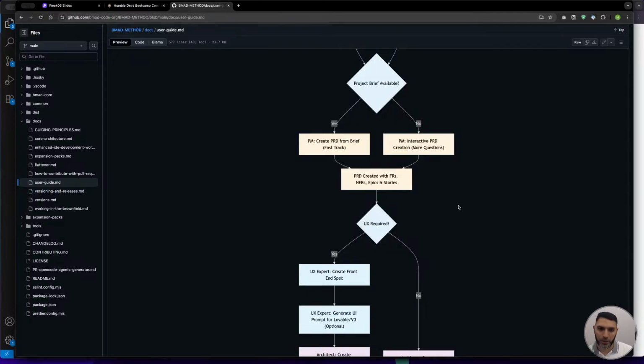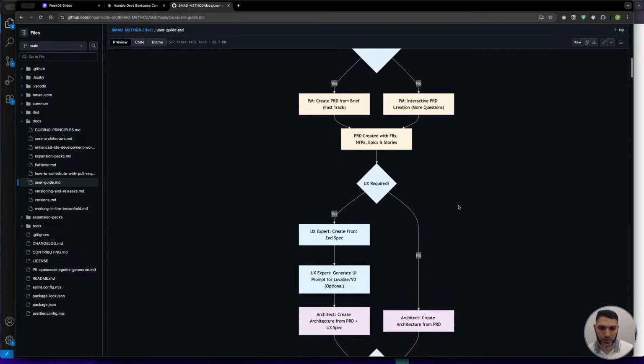So we need a form in order for people to be able to provide us their email address, password, all these kinds of things. How will this be communicated to the platform that we're going to use to authenticate? So all of these things are then tasks or stories within that epic. And the epic is there to make sure that at the end of the day, when we say that epic is complete, user authentication is functional, right? And it can have 10 or 20 tasks within it, but they all fall within that epic that is just there to enable users to authenticate, right?